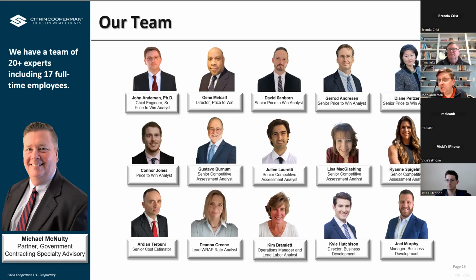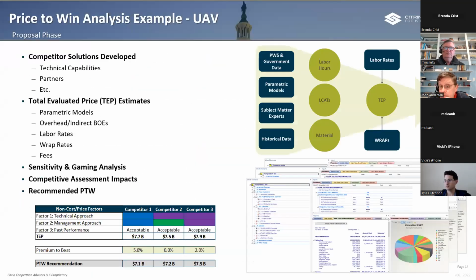Right, and be conscious of all of it. I mean, no unintended premiums. If you're going to bid something you believe is going to be higher in a particular subsystem, you need to ghost it. You need to explain why. If somebody tries to do this with 70 people, here are all the issues you're going to have. To a certain degree it becomes a visibility issue, but it is definitely something that has to be worked through.